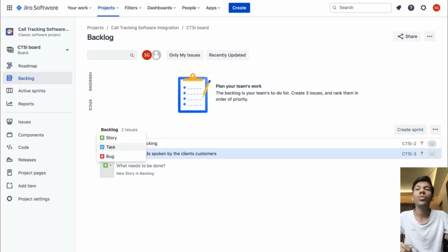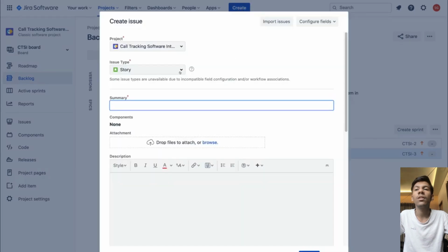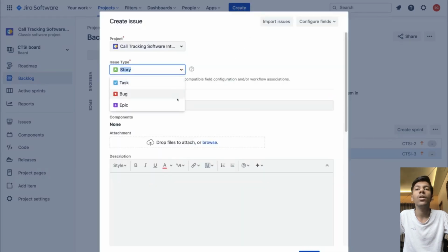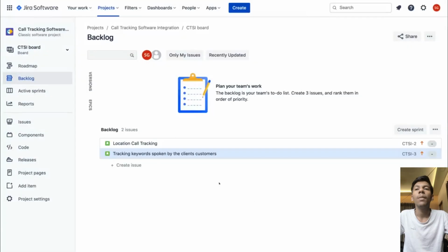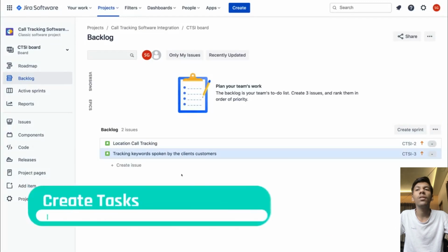So what I am going to do is click on this issue and drag it out to that sprint, and my other issue, or my other story, I drag underneath the story. So I now have two stories in my sprint for this particular project. Now I am happy with these two stories. What I am going to do is navigate over to start sprint, and then I go ahead and name the sprint if I like, but I am happy with this name.